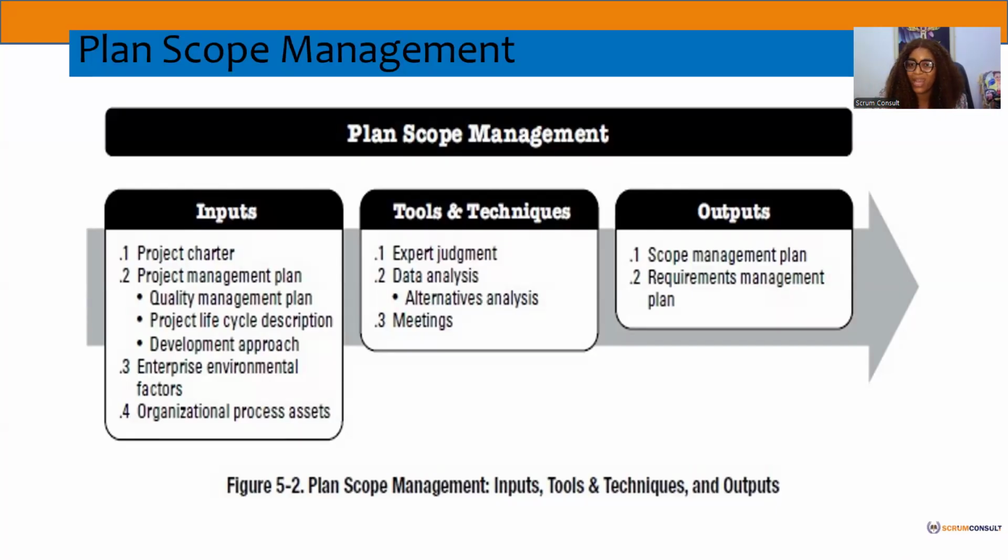And so you need to, when you are looking at how to bring in your scope, or how to manage your scope, you want to know what the requirements are. What will you be bringing in? At what time? What is the weather condition? Will it be favorable for this project at this time for us to bring in this requirement or this scope? You want to look at the market conditions. Sometimes you need to buy. What are the market conditions? What is the exchange rate when it comes to those requirements, to those needs?